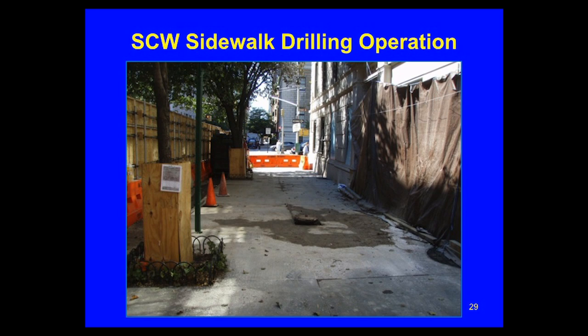In this building, it was a very narrow window, from like the middle of June to the first week in September. This is a very wealthy clientele type building, and they allow summer construction because, quite frankly, they're all at their Hamptons house or somewhere not in their building. So they tolerate summer construction because many of them are not in their building in the summer.